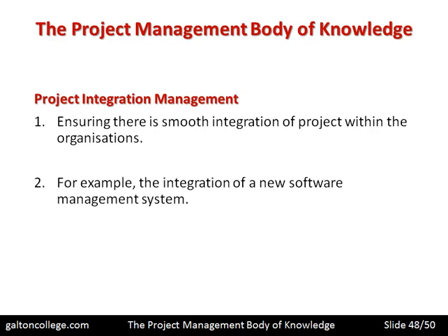So, for example, for the integration of a new software management system, there should be adequate training, there should be a gentle approach to introducing it, it should be phased in to give the staff time to adjust to it and become confident with its use. So it should be phased in over a period of time.